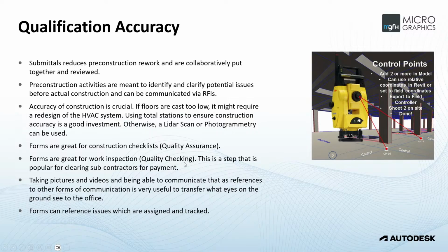And if the inspector goes out onto site, then he can take some pictures just to say that everything is okay. It's to spec and maybe fill out a form and submit that and reference the pictures or the videos or whatever and say this is done to satisfaction. And if all of the windows have been installed to satisfaction, then we can pay the contractor. But if anything is outstanding, then we would withhold payment or partial payment until that work is finished. And so that is the quality checking side of things, again, online.